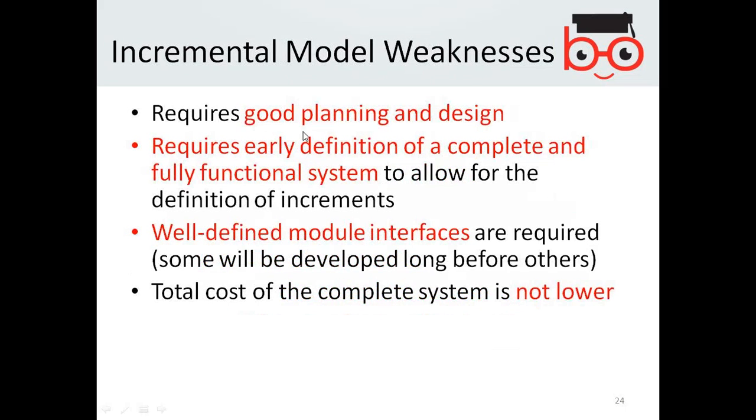Weaknesses: requires goals, good planning and design, requires early definition of a complete and fully functional system to allow for the definition of increments. Well-defined modules and module interfaces are required. Some will be developed long before others.